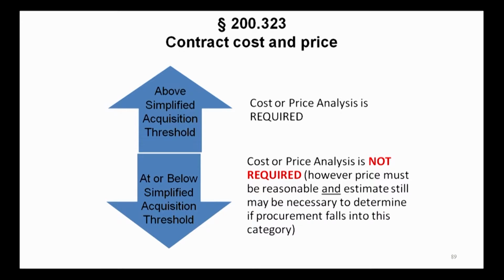Also, when you have a situation where you have no competition, then that would also require going beyond the estimate and making some cost analysis to help ensure that you are getting an appropriate price for that work, because you don't have the effect of competition at that point.